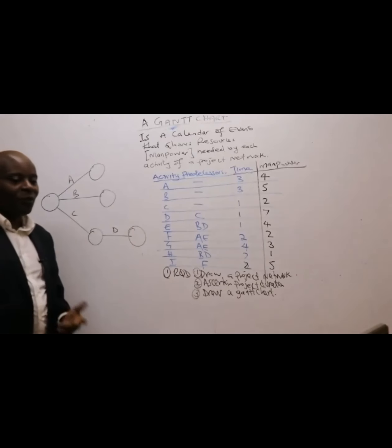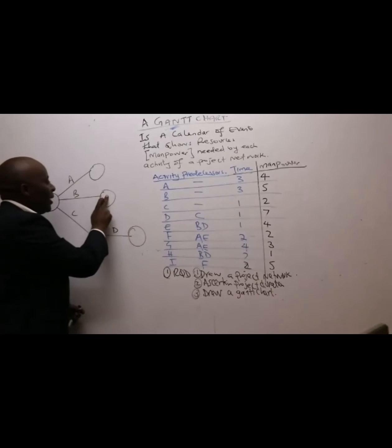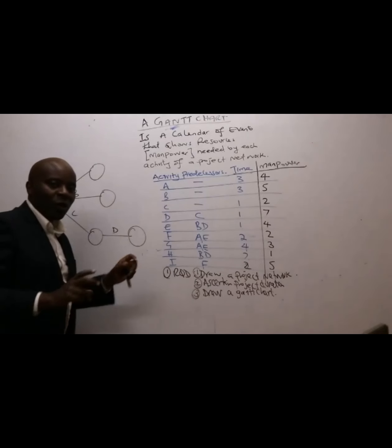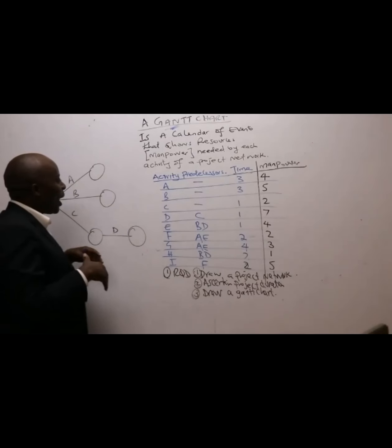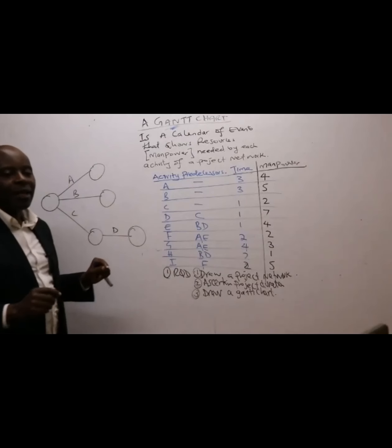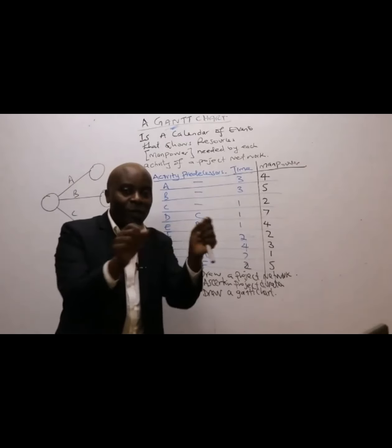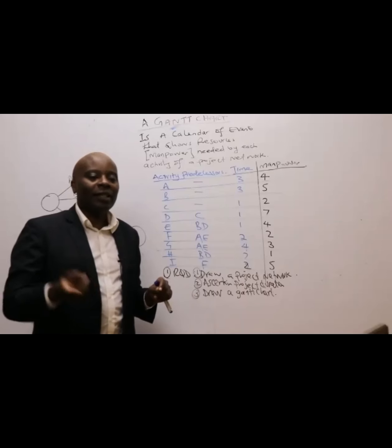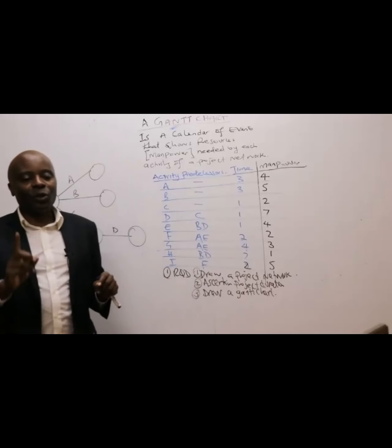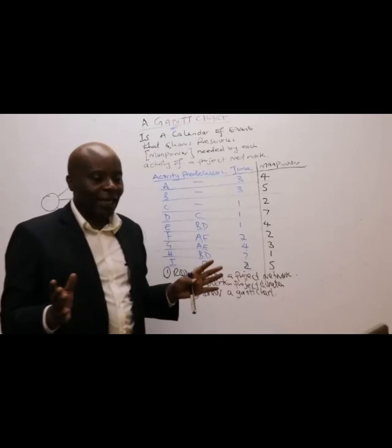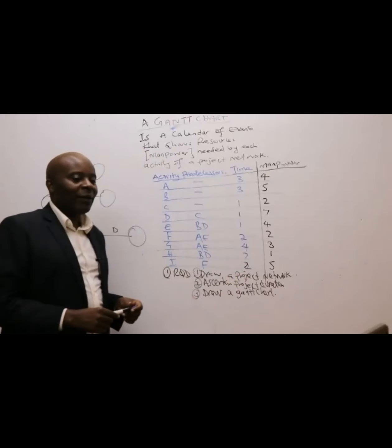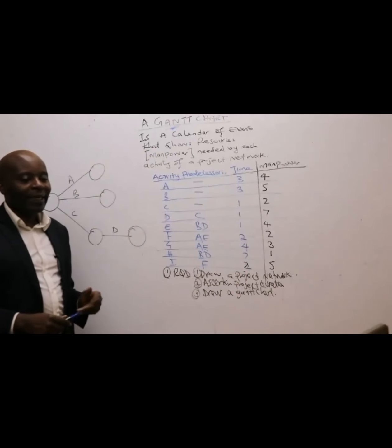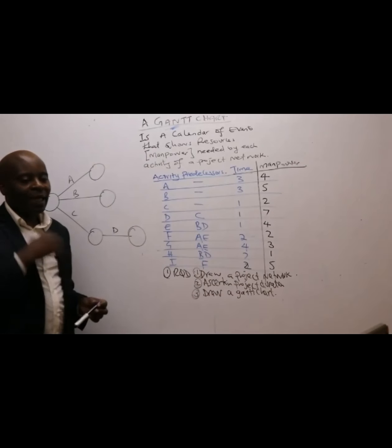Extend B to D. Thank you very much. James tells me, Mwalimu, this is the ending of B, and this is the ending of D. And I would want, in this case, to merge the two endings here. So we need to ask ourselves whether this B and D will end directly, we join them, or do we have them ending fictitiously, through usage of a dummy? Are we going to use a dummy here, or will they end directly? Do we make use of a dummy? They must end directly. No dummy needed.